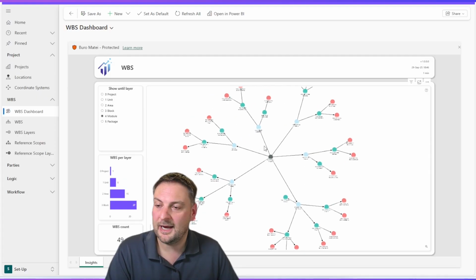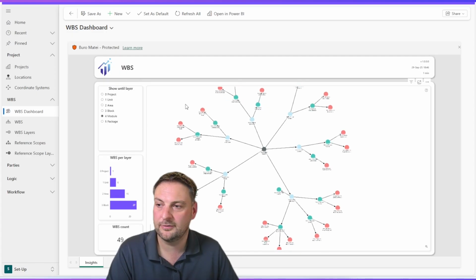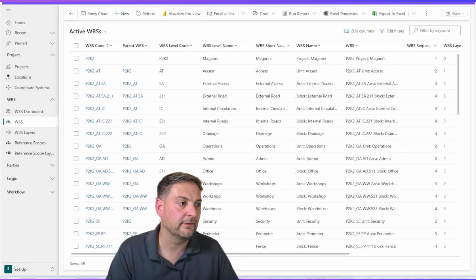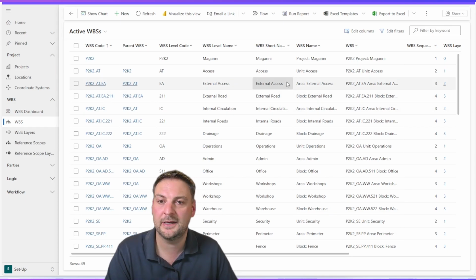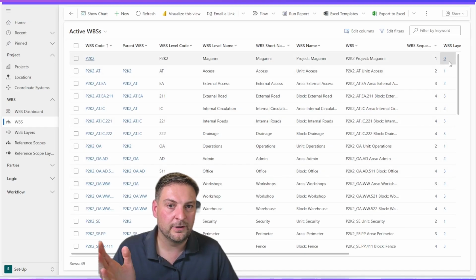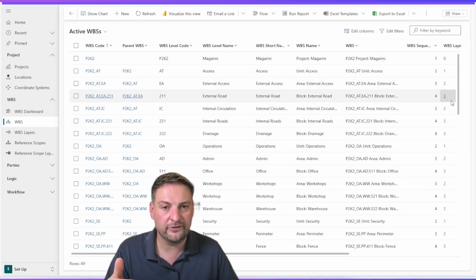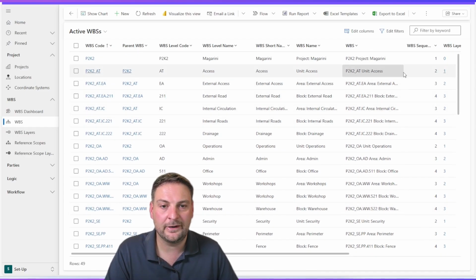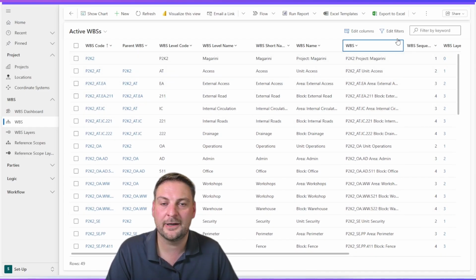We have, let's say, high granularity in our WBS. We want to go up to a module level. So let's go back to the WBS and basically repeat that process with the import, because definitely this one is going to be a long list. So I'll break it down. First, I did level 0, 1, and 2. And then because 2 was available, I was able to import layer number 3. And now I'm going to import layer number 4.